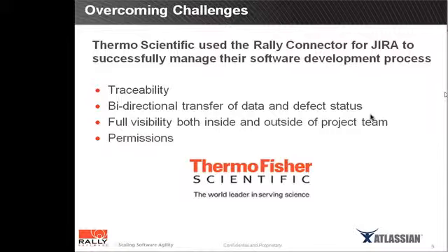Traceability into unit test results and the source control repository has required us to take advantage of another Rally integration product, the Microsoft Team Foundation Server connector. With this connector, we were able to link Rally user stories, tasks, and defects to the source control that was changed to implement them. There's a link in Rally to the TFS change set and a list of sources that were changed in the Rally artifact. Thus, we have complete traceability from the defect in JIRA to the change set in TFS.